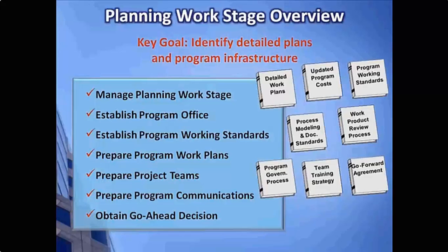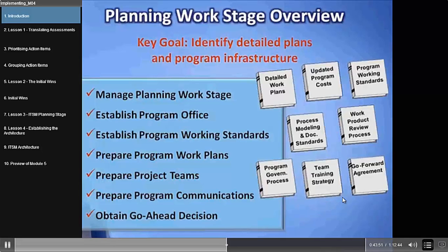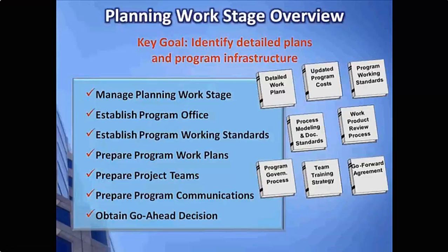So here we're going to establish that program office, in other words, putting the resources in place to run. Now, the reason we're doing this as a program, remember, is that this is not just one project, but is a series of many projects. Plus, remember that this is also ongoing. So if we are having a number of initial win efforts that are going on at the same time, we want to make sure we coordinate those efforts through a generalized program office structure.